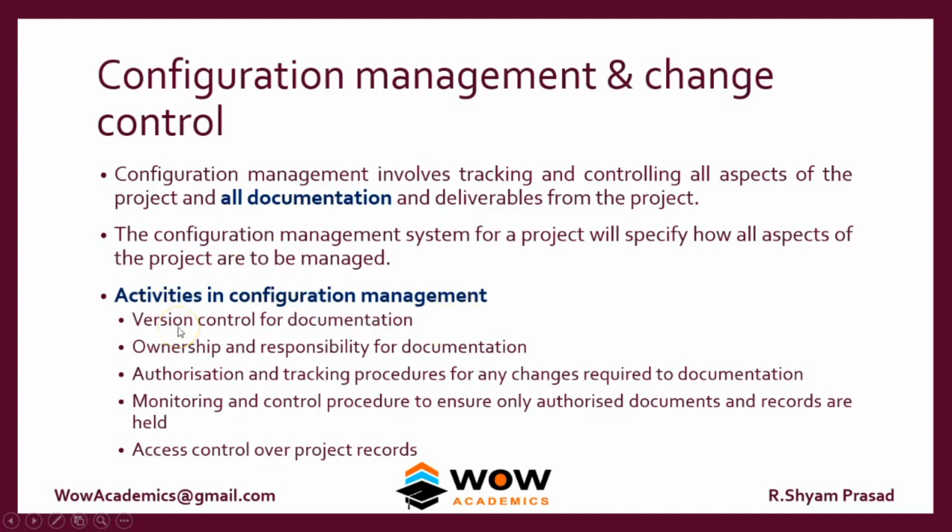Activities in configuration management. The work they do in configuration management is to control the versions, version 0 to version 6, and ownership and responsibility: who is responsible for documenting and recording all these versions, who is authorized to change the versions, who is authorized to track the version, who is monitoring them, who is controlling these changes, and who has access to these records. So it's about the documentation and the entire ownership of the documentation.